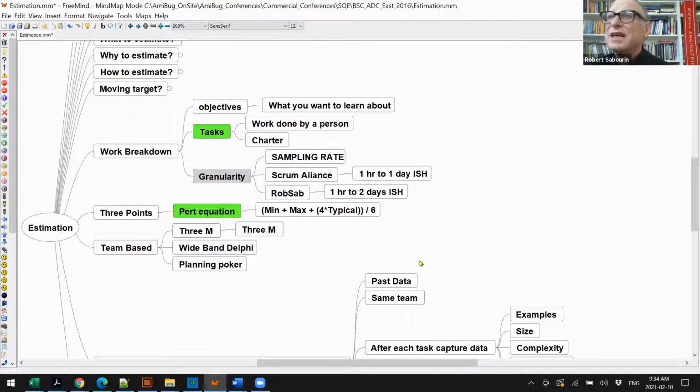I just spent yesterday a couple of hours looking at this very issue with a customer of mine, believe it or not, in Colombia. And they were talking about software for one of the most important travel sites in the world. And their granularity for every single task is between 1 hour and 8 hours. As a rule, they never break it down bigger than 8 hours. And that's a huge company, major projects all over the place. So it's not just Rob saying this. It's really important. Break it down to chunks of that granularity. So that's just work breakdown.